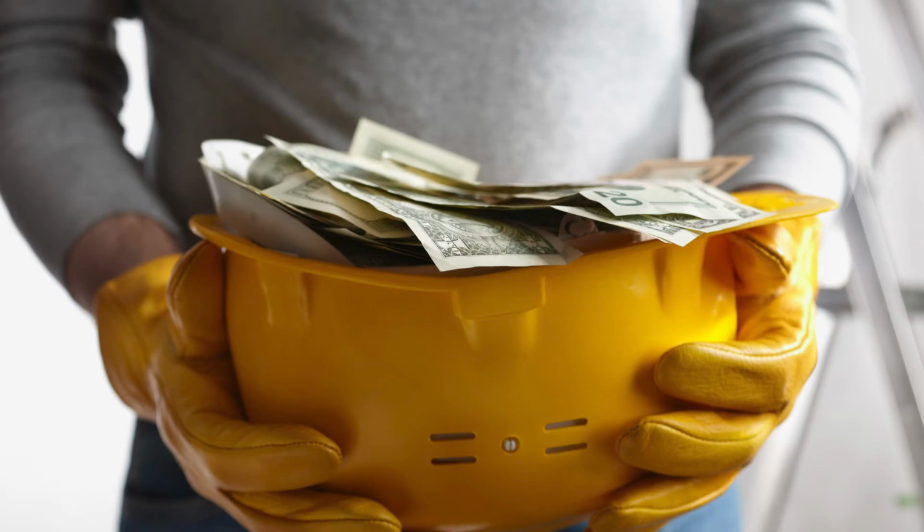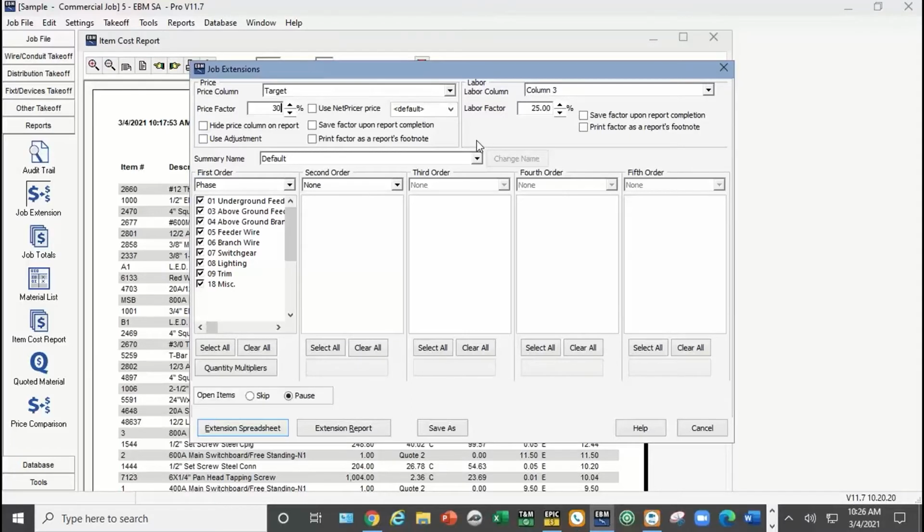The other issue will be overhead and profit, or sometimes it's just an across the board markup. That may be something that's in the contract. You may have to negotiate it. A lot of the times, it's negotiated after you submit the first change order, and they say, "What do you mean 15% overhead and 10% profit?" So you've got to be prepared for that and make sure that you've got yourself covered in how you price the material, what labor units you've used, and that kind of thing.